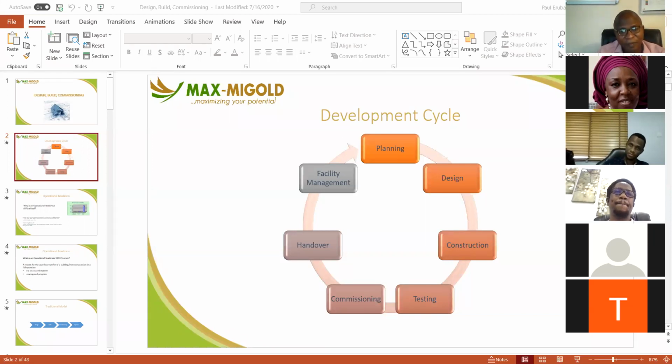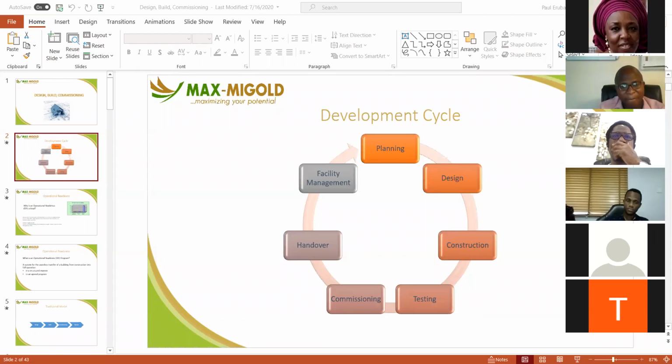Theodora, a question. If the contractor doesn't give you an as-built drawing, if it's not in the contract and your organization is not ready to pay extra, what do you do? Either you bend down with your tape and measure and draw by yourself, or you get a consultant to come and help you do it. We typically do that; it's one of the things we have people doing every day. If you have a building that people have abandoned, we put a team in there, but there's no way it won't cost you money. You have to pay consultants at some point to generate it for you.